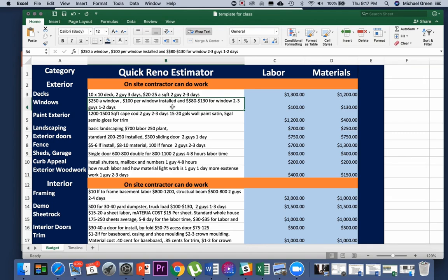And if there's a couple of repairs throughout the house, I've seen people replace whole houses of windows for like $3,000 or $4,000, when they could have spent like $500 to $600 repairing them and cleaning them. Well, that's a big savings if you think about that. And my experience has been it doesn't cause the house to sell for anything less, as long as the windows are in good working order and they're vinyl.